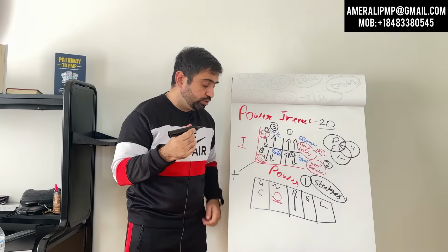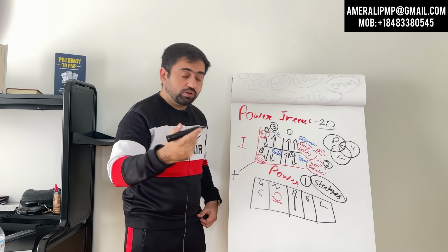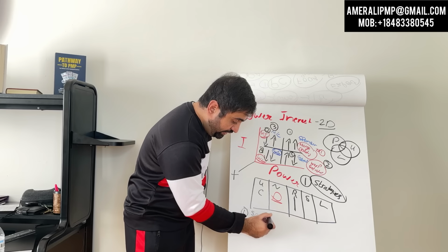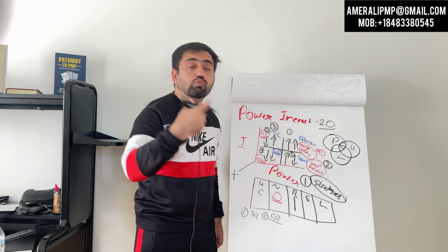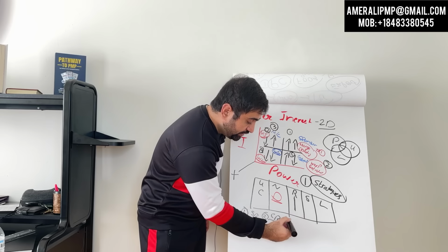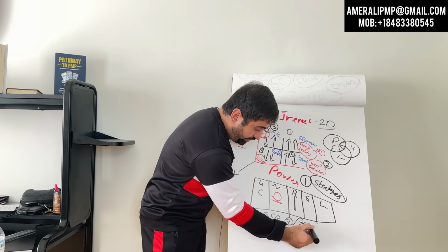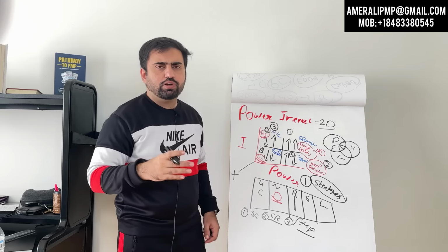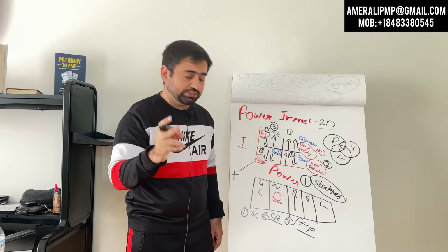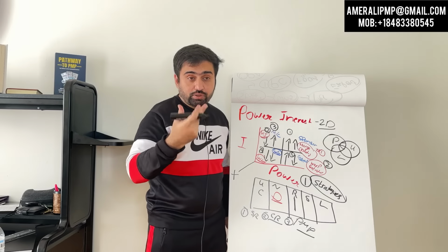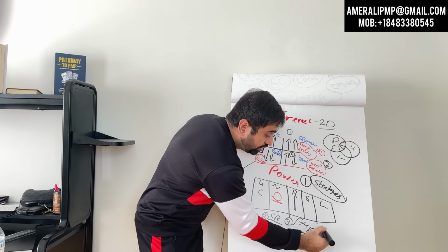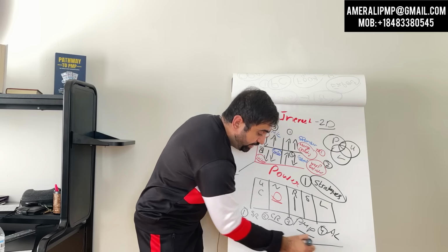Another sequence that you may see in the exam: when a new stakeholder comes, you will update the stakeholder register, then you will need to raise a change request. Once you have raised the change request, through that change request all the plans can be updated, which we will discuss as we move forward. Project management plan, all the plans can be updated through one change request. And after that, maybe you have an assumption log or a risk register that may need to be updated later on.